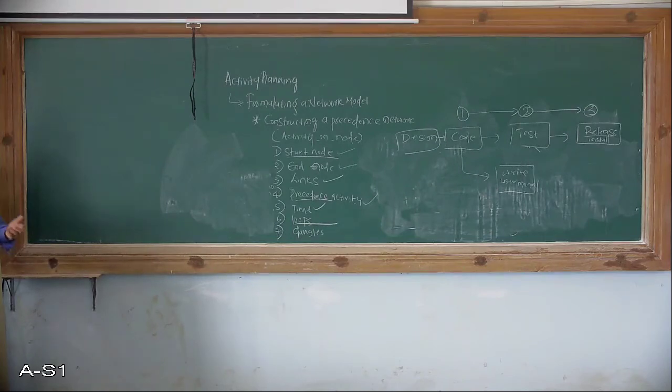Let us go through it in depth. A dangling is an error revealed in a subsequent analysis. Indeed, in many cases dangling activities indicate errors in logic, and activities added as an afterthought. You have already proceeded, then you have an idea in your mind saying okay, I have to work on that, so this is left. That is nothing but your dangling. You should not have a dangling in between the project status.